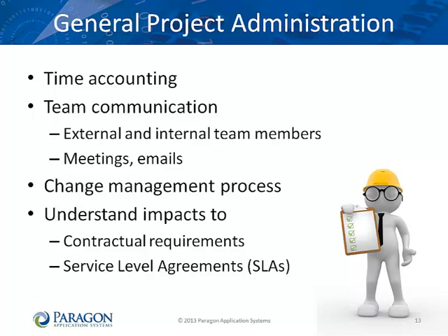There may be short daily status meetings between the members of a single team, for example, development. There will probably be weekly meetings between each project manager and the teams they are managing. There will probably be weekly meetings between the project managers and the program office. And you may be required to meet with the company executives on a monthly basis to assure them that the project is moving forward as expected. Send out meeting invites to make sure they get on everyone's calendar.